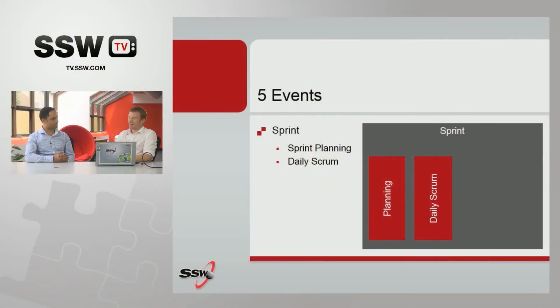So you still need the product owner there, but they're only there in a sort of ambassadorial role, just giving information as opposed to driving the process. At this point, it's fully the responsibility of the team. They own the sprint backlog. They're creating the tasks that are going to go in the sprint backlog. They're doing all the estimation, not for the product owner, for themselves. And that's it. Okay.